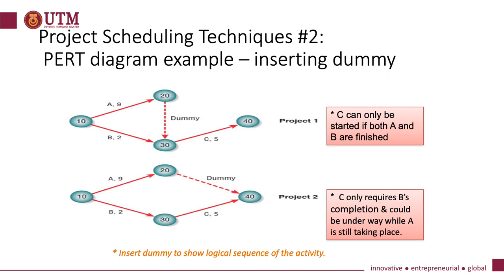Let's look at how PERT diagrams are developed with dummies. The figure shows two PERT diagrams with dummies. Note that project 1 and project 2 are quite different. In project 1, activity C can only be started if both A and B are finished, because all arrows coming into a node must be completed before leaving the node. In project 2, however, activity C requires only activity B's completion and therefore can be underway while activity A is still taking place. You can observe that project 1 takes 14 days to complete, whereas project 2 takes only 9 days.